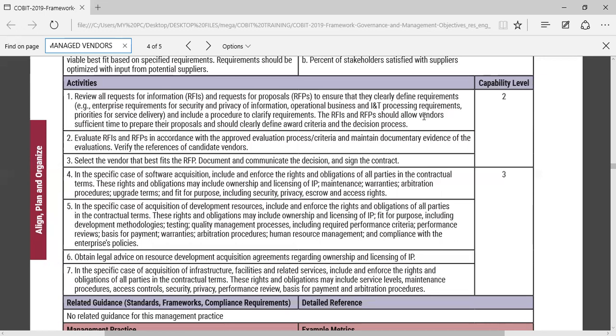What's escrow? Now, this is very important, especially for very big projects, very big software acquisition. All right, you are buying a software that is not your own as an organization, and that software is very crucial to your operations, man. You need to ensure you have an escrow agreement, which is that there's a third party that the two parties agree to keep the copies of the source code with, in case something happens to the vendor organization.